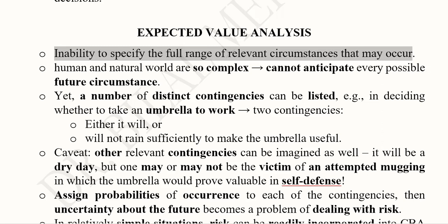But in our other projects, there can be a variety of issues. For example, in an infrastructural project, there are many possibilities of various events that can happen. There can be some war, there can be some natural calamity, there can be scarcity of some integral input, and there can be a decline in the demand for the services of that infrastructural project that can be given to the people.